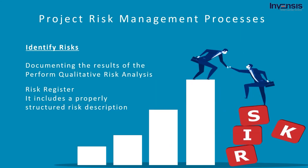Now we will discuss documenting the results of the identify risks process. It is important to record the identify risks process results to capture all relevant information currently available for each identified risk. The only output from the identify risks process is the risk register. The risk register includes a properly structured risk description and the nominated risk owner for each risk, and may also include information on the causes and effects of the risk, trigger conditions, and preliminary responses.